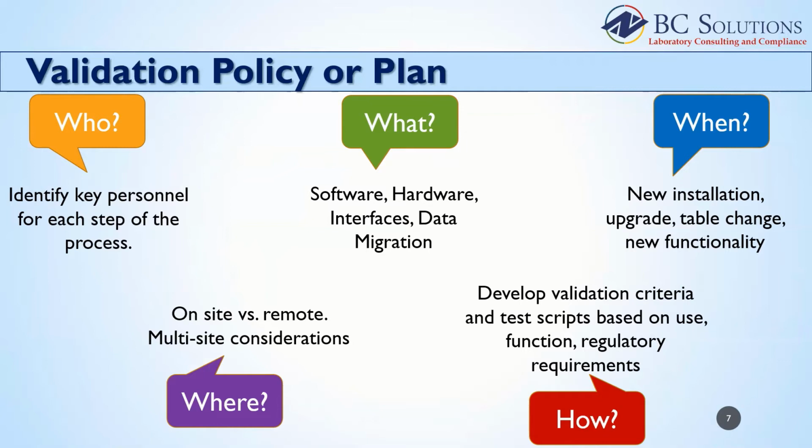Your validation plan should detail what constitutes a change and how the change is evaluated. In any of these situations, a risk assessment will need to be performed. Change control is a critical part of your validation master plan. It will detail the steps needed to maintain a validated state throughout the software lifecycle.